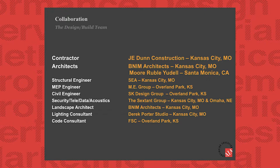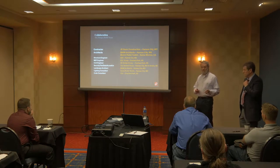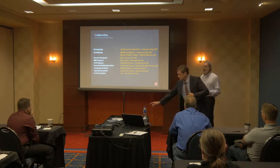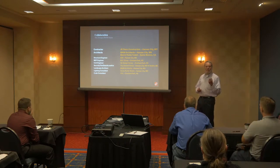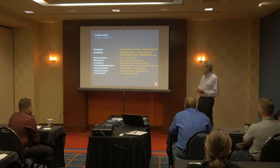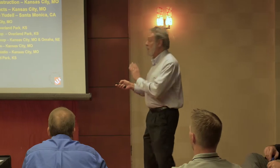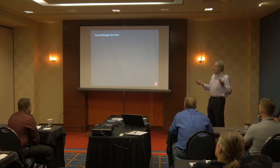An interesting project in that when we interviewed for it with the University of Missouri, we interviewed for a traditional design bid build process with Moore Ruble Yudell and were selected. Through a lot of curious political intrigue, the delivery method changed to a design build situation, and we transitioned from working for the University of Missouri to working for J.E. Dunn. And so that did influence some of the decision making that we did on the project. So that was a very, very interesting process. The general design overview, since we're architects, I had to put some of this in.